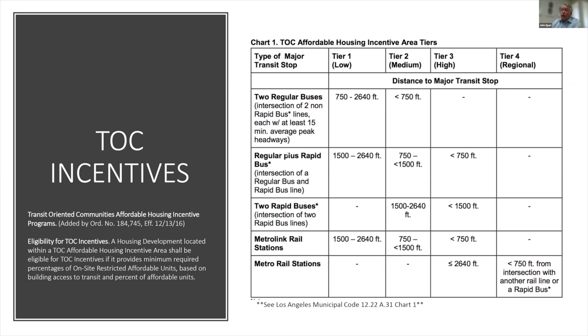You can be a year into a project and then the city turns and says, this is no longer a tier three project, it's a tier two project, and your density is impacted. And I'm saying that from experience, it's happened. You work around it because obviously city officials are there to help you build affordable housing. At the same time, they now have a reservation program for that.